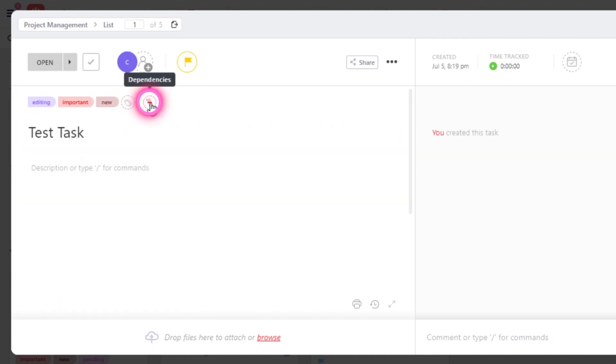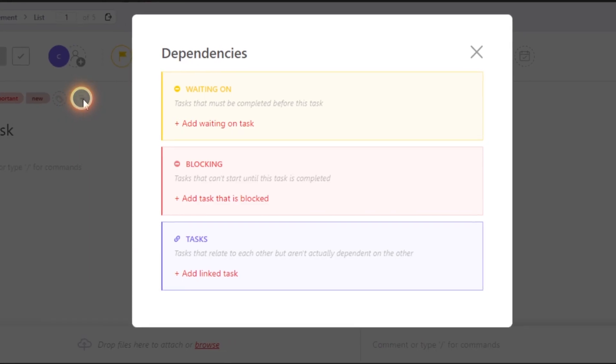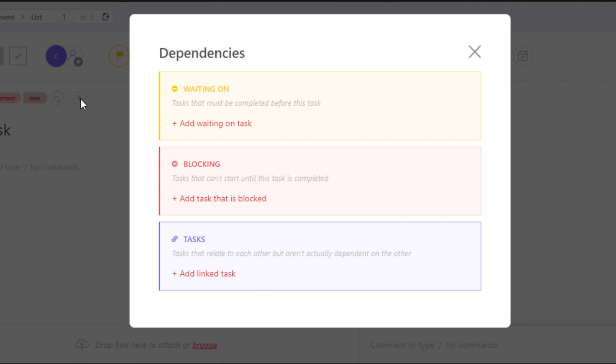Now we have dependencies. So if you want to select a dependency for your task where you can create a task and then add a dependent task on it, you can do that as well. And then this task will be initiated when another task is done. Similarly, we can do blocking and linked tasks as well.